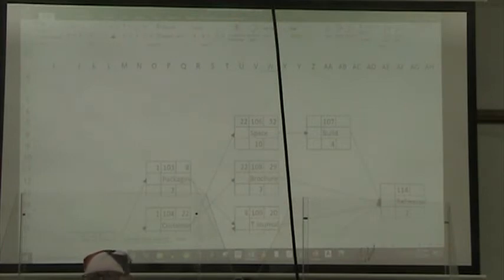All right, so we come over here. Now here is the activity of building our kiosk. And it only has one predecessor, right? So we're going to say that that is just equal to our early finish for getting a space at the trade show.